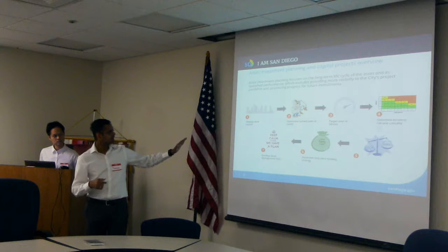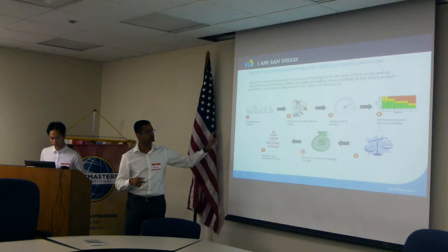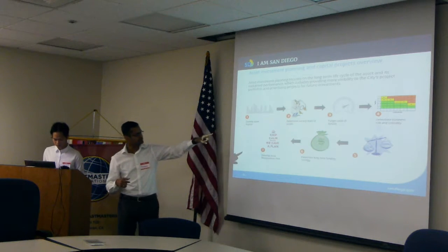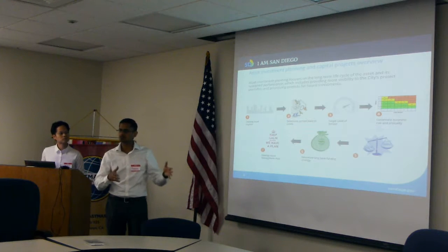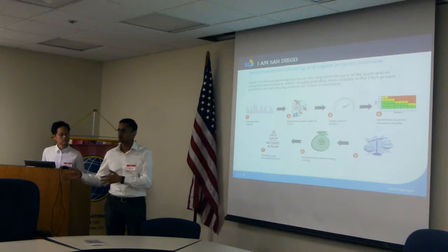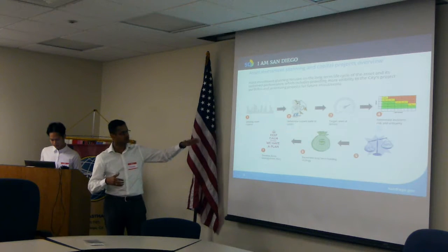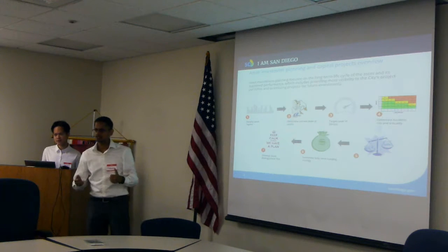But sticking to this slide, this gives an overview of the process the asset goes through, where you determine the target level of service, depending on what asset it is, whether it's a road, sidewalk, water treatment plant, or street light. What level of service does the asset require, and also the risk and criticality of a failure of that particular asset.